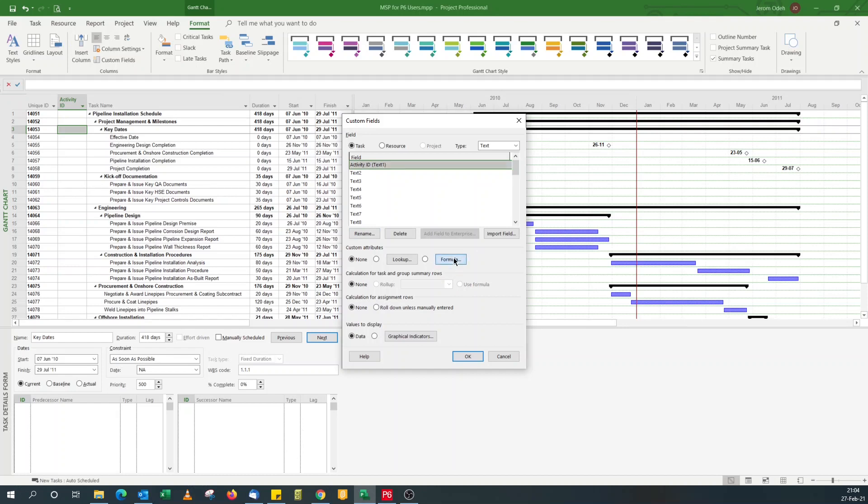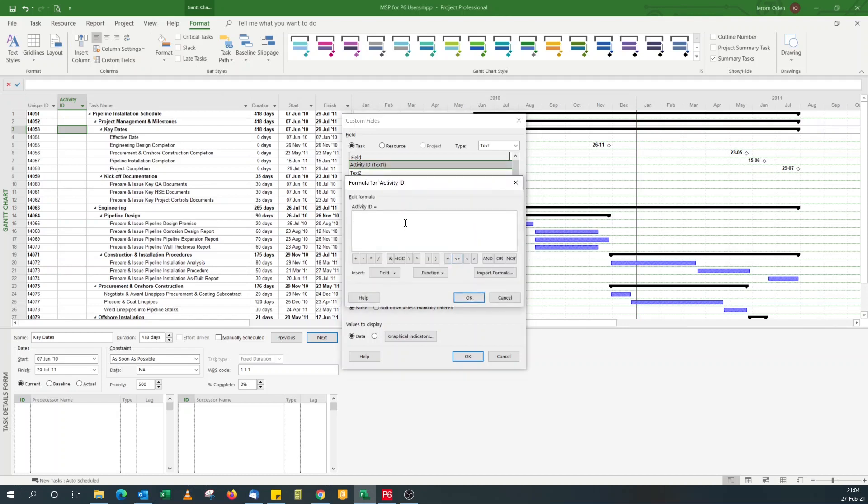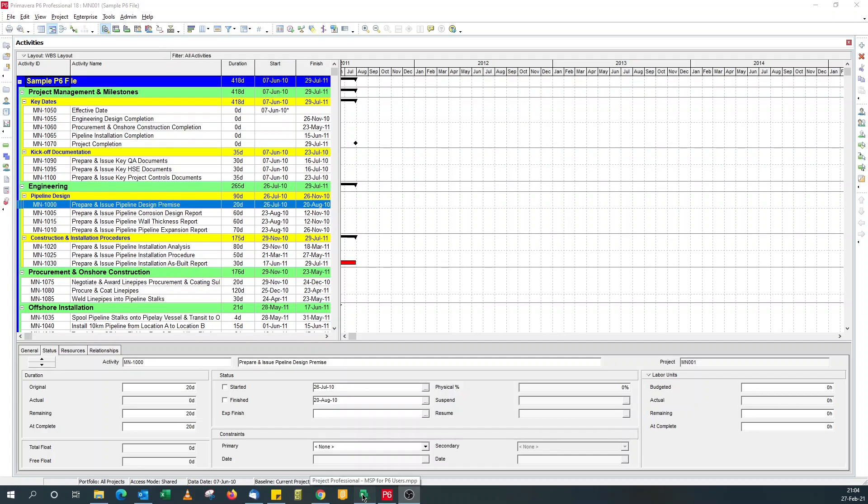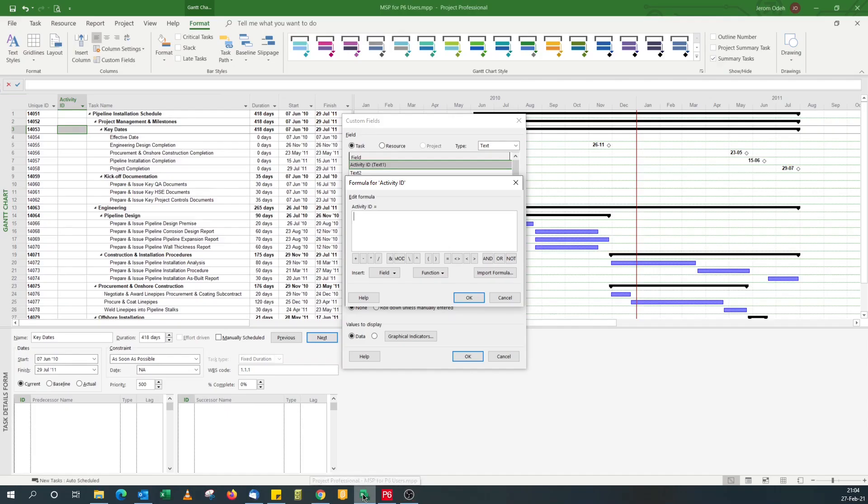I need a formula to make unique IDs alphanumeric. So I click on the formula button. And what I'm going to do is to append the prefix to the unique ID. And in this case, I'm going to go with the sample P6 schedule MN dash as a prefix that I append to my unique IDs.